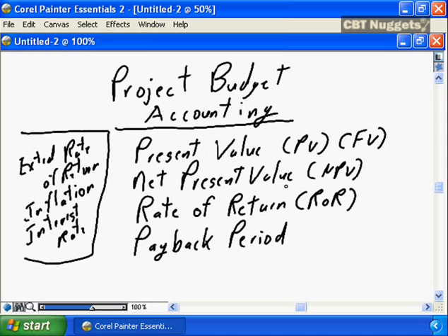What's the net present value? It is the present value of benefits minus the present value of the costs, i.e. what is the return on your project? If you take the full discounted future value of benefits minus the full discounted value of the cost for your project, what is the return? Again, is the company better off investing in your project, or is the money better off taking the funds from your project and putting in the bank and earning interest, which is equivalent to our rate of return? Is this a good investment decision for our company or not?